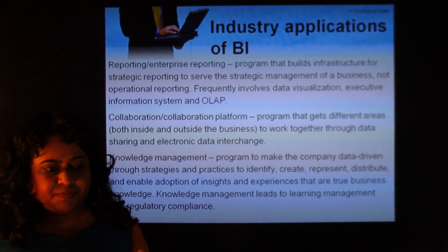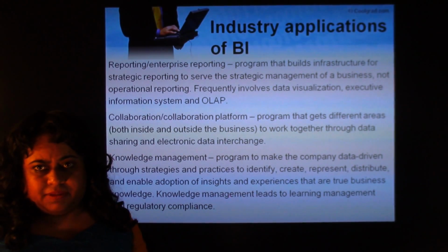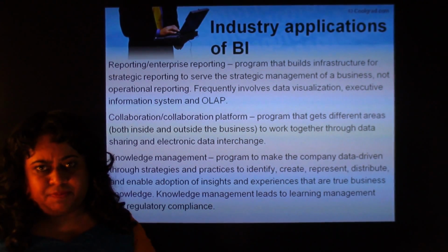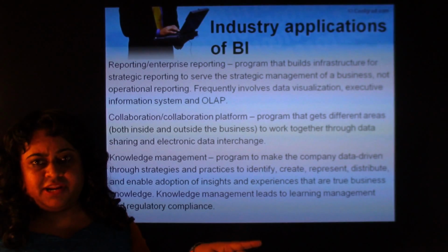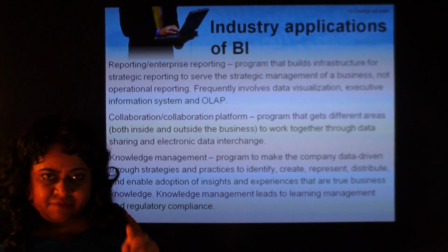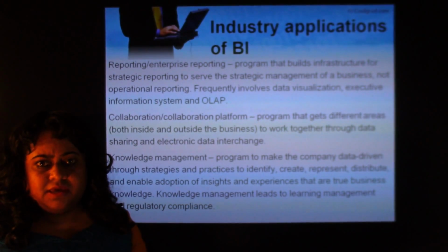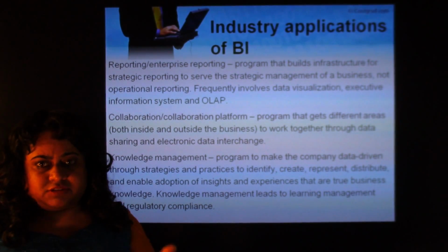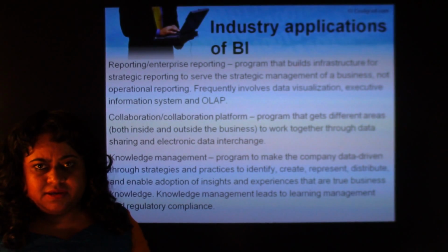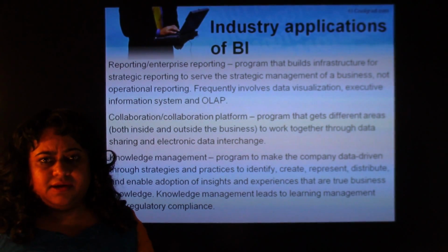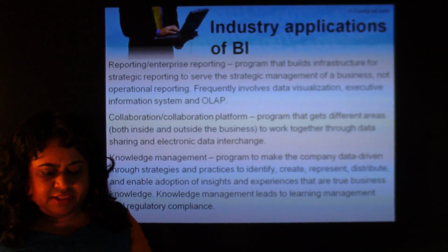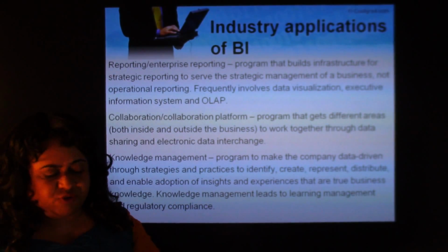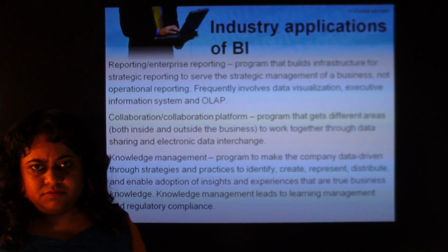And sometimes they learn so much as they're doing things on the job. Sometimes there was a problem with the installation which caused this problem. Sometimes the customer was not trained how to use this correctly, so that caused this problem. So that is an input for the training department. Next time when you're doing the training, emphasize that they should not make this mistake. So suppose the guy who was doing the installation didn't do his job right, then that caused the problem in the use of this equipment. So then we write a knowledge article, and during installation the guys are trained. So the installation guy is advised to make sure this problem doesn't occur during installation.